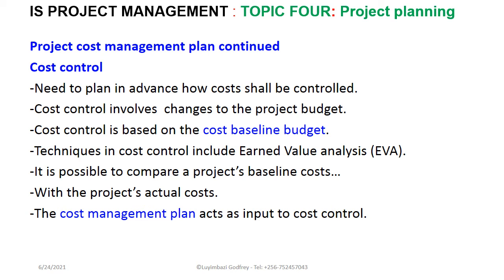Cost control is basically based on the cost baseline budget. There are various techniques that we may use in cost control, one of them known as the earned value analysis technique. With this technique, it is possible to compare a project's baseline costs with the project's actual costs. So the cost management plan acts as an input to cost control. More on project cost management will be handled in our topic number 5, when we are looking at the various project management areas of knowledge.